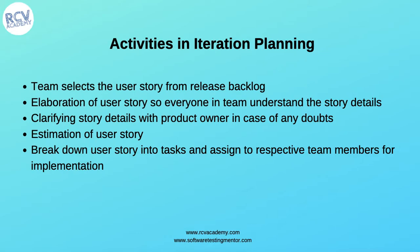The story is elaborated in iteration planning so the team understands the story details. Any doubts are clarified within the iteration planning meeting — from the Product Owner or the Business Analyst participating in the meeting. Then estimation of the user story is done, and the user story is broken down into smaller tasks and sub-tasks assigned to respective team members.